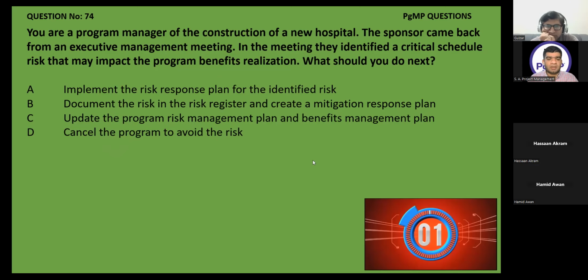Mullah sir, can you give us more explanation on the risk flow? So this topic is clear. Yes, sir. Actually, when the risk is identified, as is the situation in the question, they have identified a critical schedule risk during the meeting. So it should be first of all logged into the risk register.